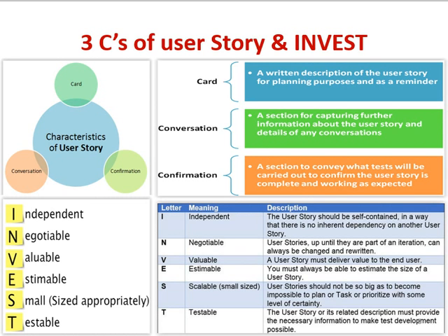It's not that you create a user story, develop it, execute and test it, and finally come to the customer asking whether your user story is ready or not. No. User acceptance criteria are given by the customer or the end user at the beginning of the user story itself. So you have your vision in mind before starting to work on the user story.